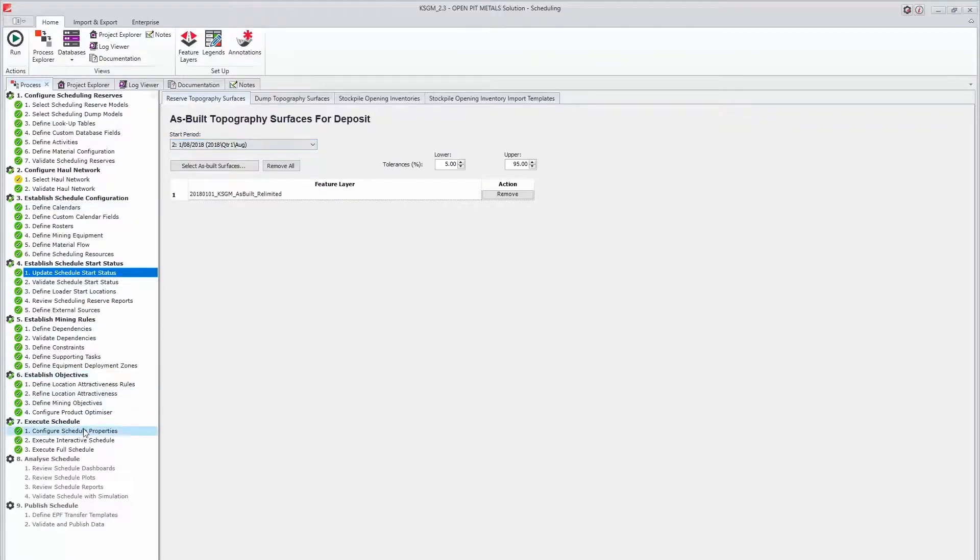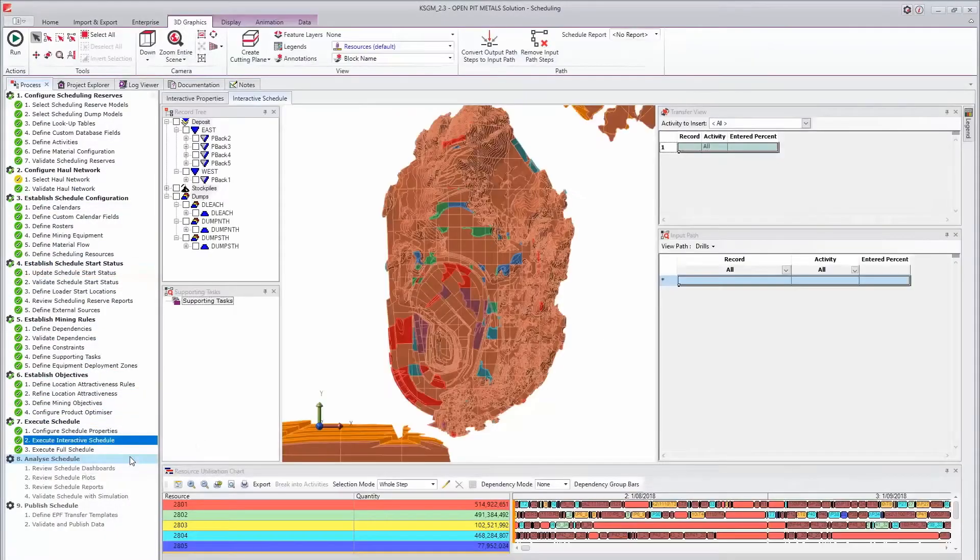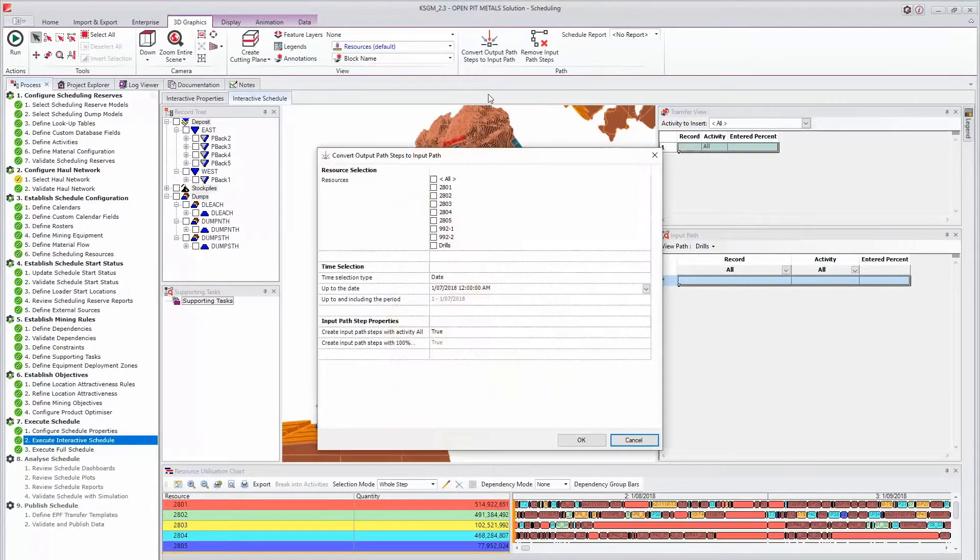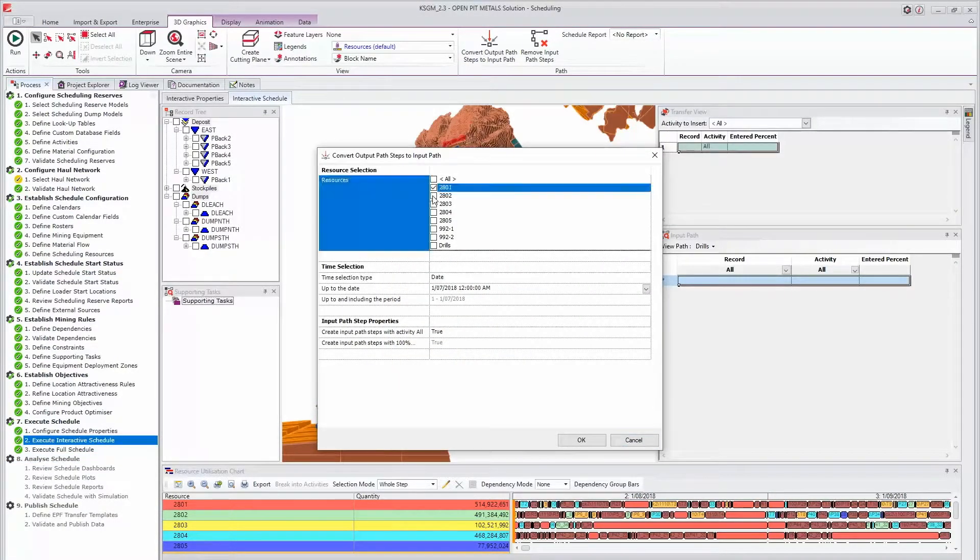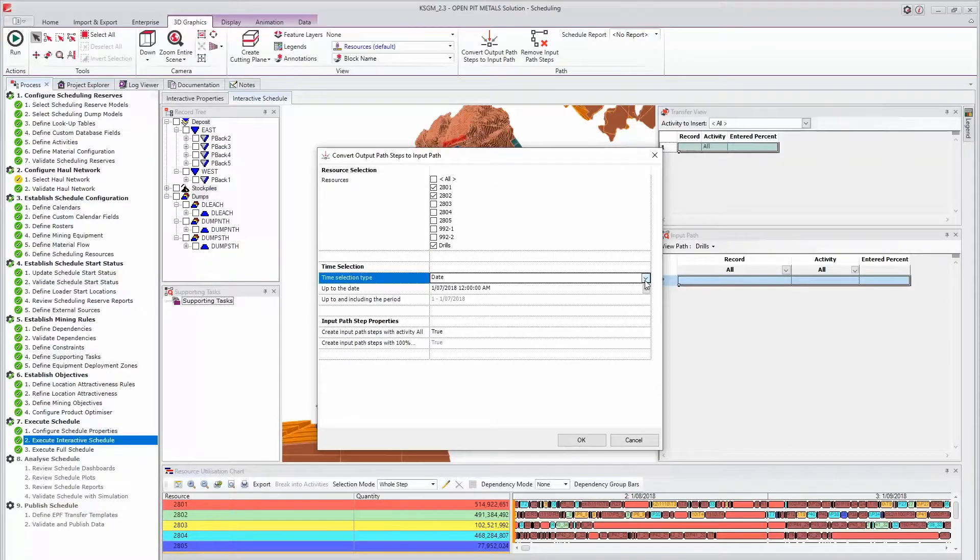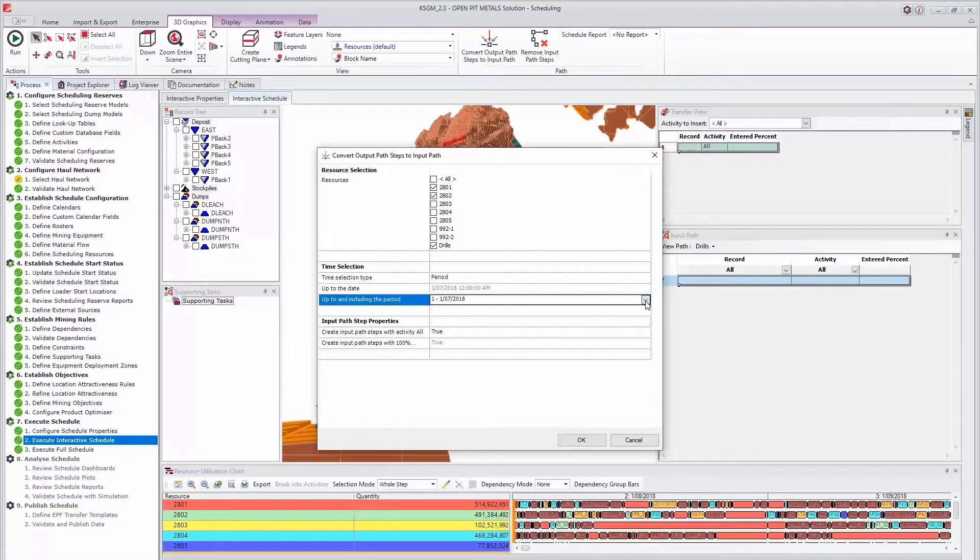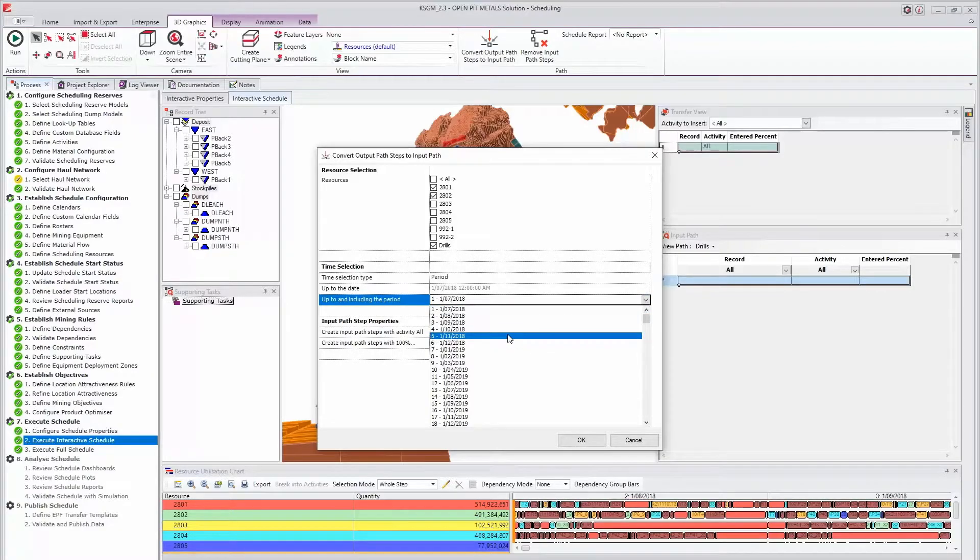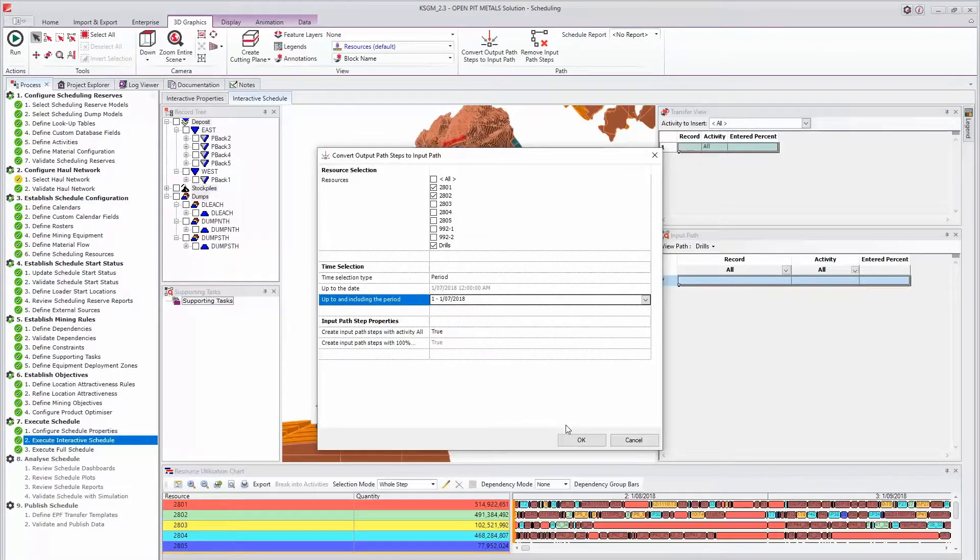There are no productive steps in the output path before the pre-scheduled start period. Accordingly, converted pre-scheduled periods will not create any entries in the input path. This is a common mistake when wanting to convert scheduled periods to an input path.